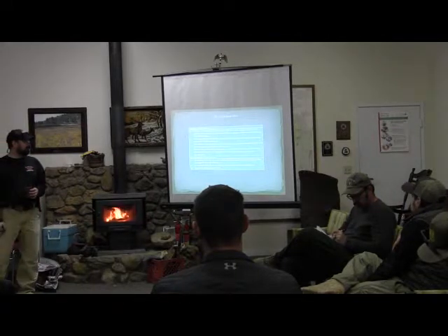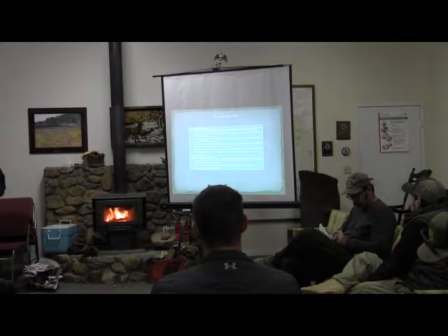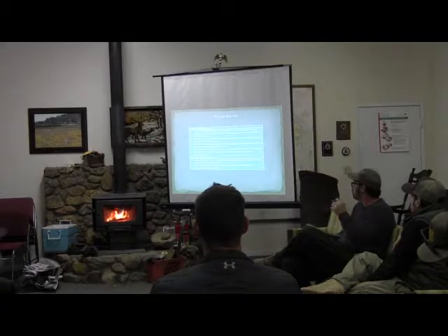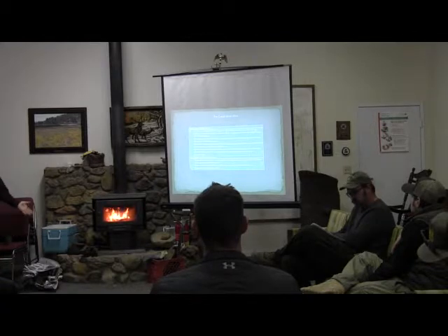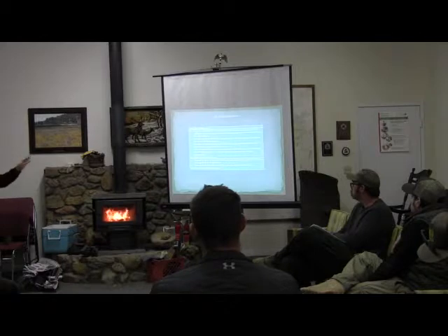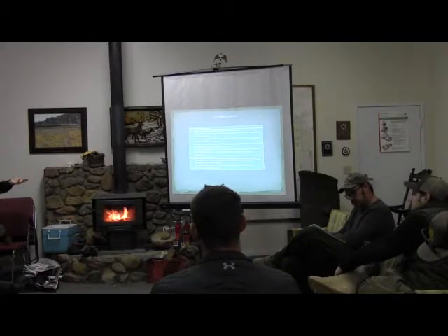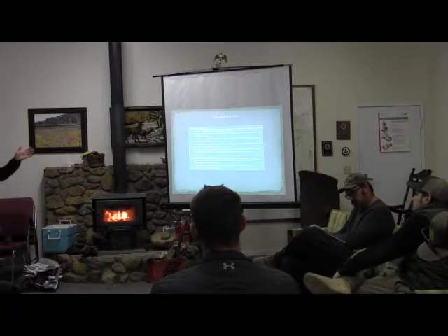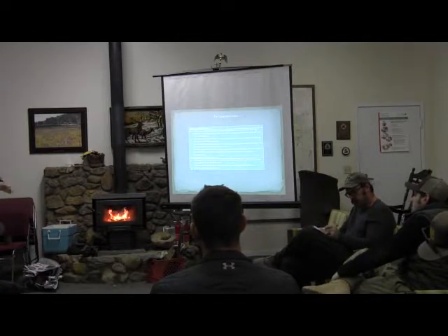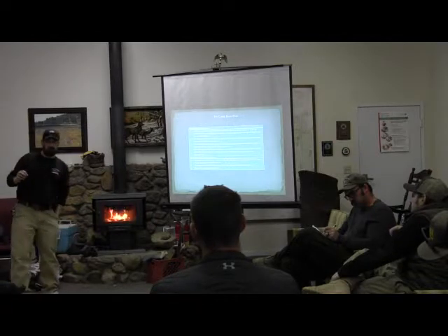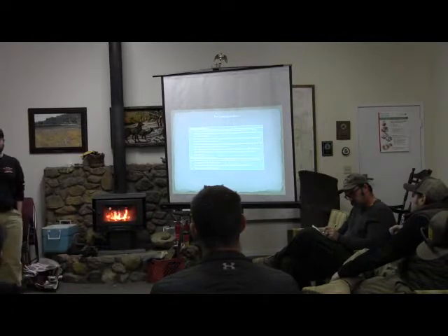Can you guys read this? This is actually good, and normally people can't read it. This is from the Fry Creek burn plan. I think I wrote this plan. So most burn plans should have two types of objectives. There should be your resource objectives, and then your prescribed fire objectives. Obviously, your prescribed fire objectives are trying to achieve your resource objectives. The prescribed fire objectives just become a little bit more detailed on how you're actually going to achieve the burn.